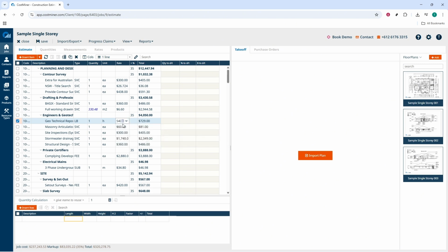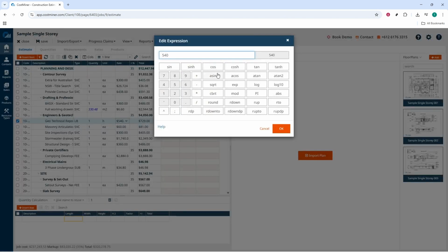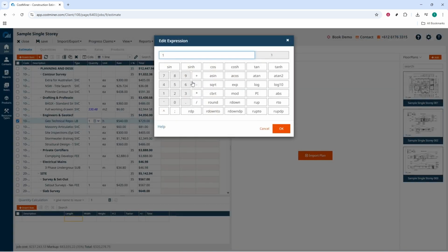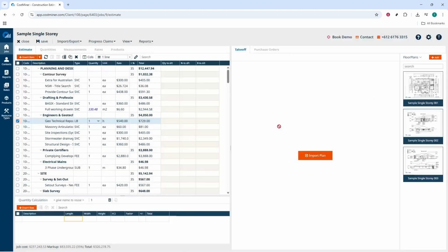Use the fully burdened rate if your estimate requires it, including allowances like benefits and overhead. Then enter the quantity or productivity. If you know the hours required, enter that directly as quantity. If you're working from productivity, ensure it converts into a quantity that matches your chosen unit. For example, if a task needs 16 labor hours and your unit is man day at 8 hours per day, that equals 2 man days.